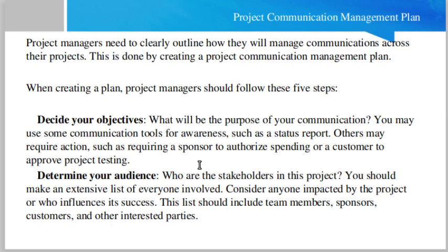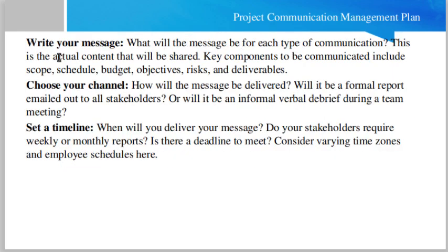Then determine your audience. Audience means the persons who will be your audience, because whatever management plan you are making, you must know which type of audience is in front of you for which you are making the plan. Write your message, that is, what the message will be for each type of communication. This is the actual content that will be shared. Key components to be communicated include scope, schedule, budget, objectives, risk, deliverables.